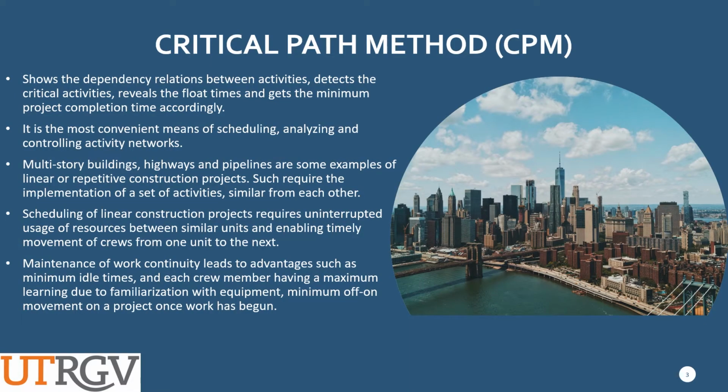The CPM shows the dependency relationship between activities. It detects the critical activities, reveals the float times, and gets the minimum project completion time accordingly. It's the most convenient means of scheduling, analyzing, and controlling activity networks.